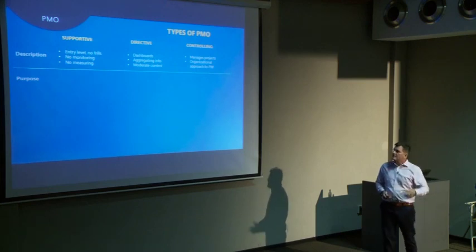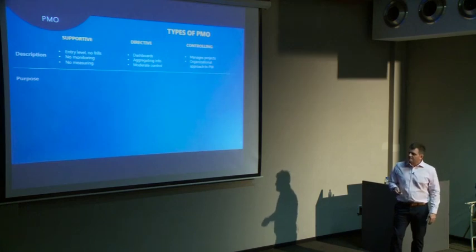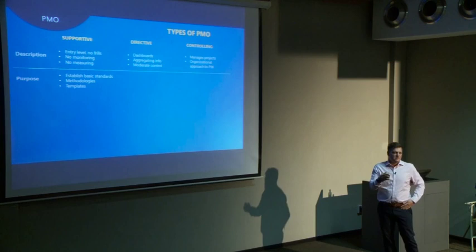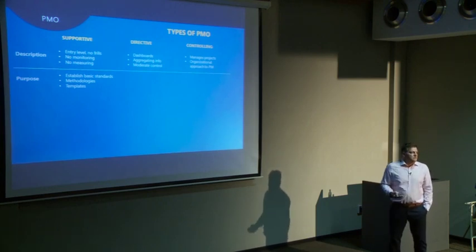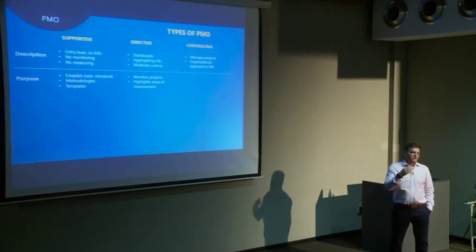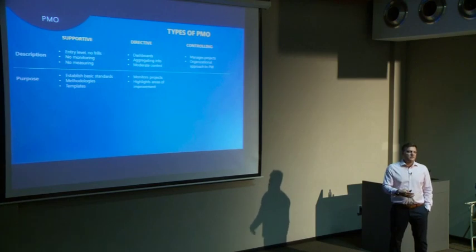I mean, it's important that you understand the different concepts of what it's used for. So really the purpose of a supportive PMO is to establish those basic standards. They provide methodologies and templates on how to manage projects, right, in the organization. The directive PMO would probably monitor your project. They might give you input into areas of concern or opportunities to improve those projects.